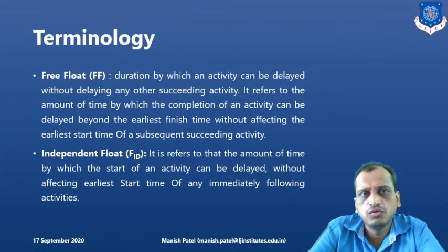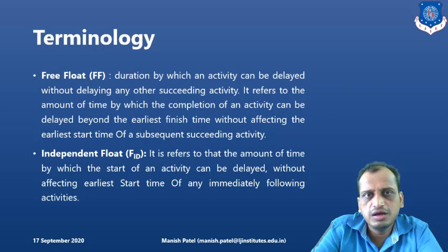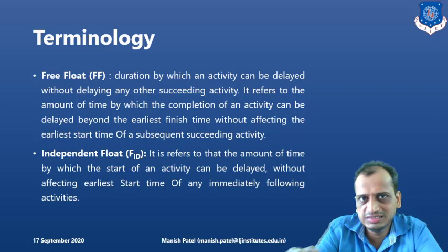Another float is the free float. Now, what is free float? It is the duration by which an activity can be delayed without delaying the succeeding activity. So let's say, for example, 2 activities are there, the first and second activity. Now, the first activity's duration is 5 days, and the second activity's duration is 7 days. Now, we can delay the first activity without affecting the succeeding activity. If we delay this activity so much that we cannot start the successor activity, it should not be like that, right? So that duration is nothing but the free float.